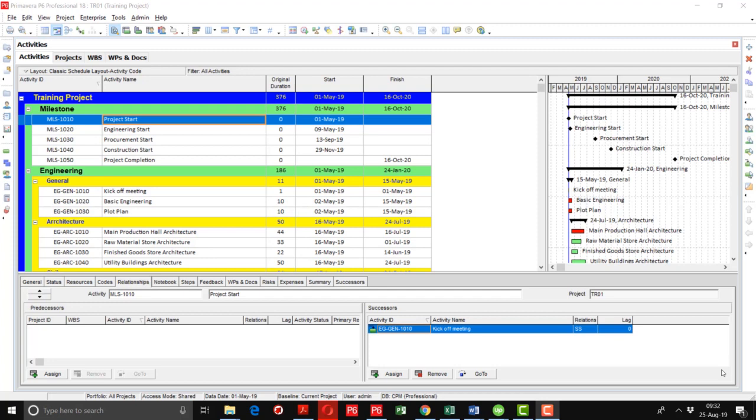you have a foundation, and that is going to be completed on 15th of April, but its equipment is coming on 25th of April, so you cannot install the equipment before 26th, regardless of whether the equipment foundation has been completed or not. For such kind of activities which are not in our control, we have to apply the constraints so that we can see the impact of those constraints as well.